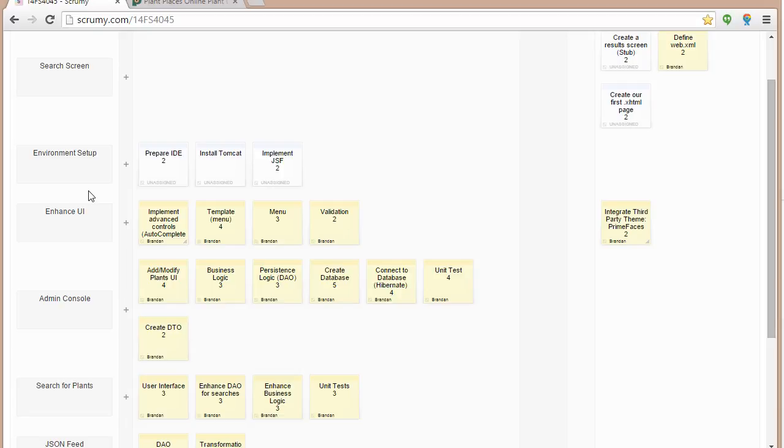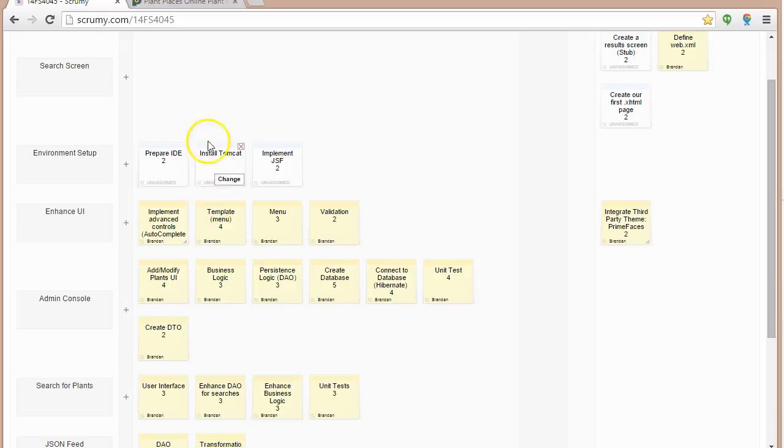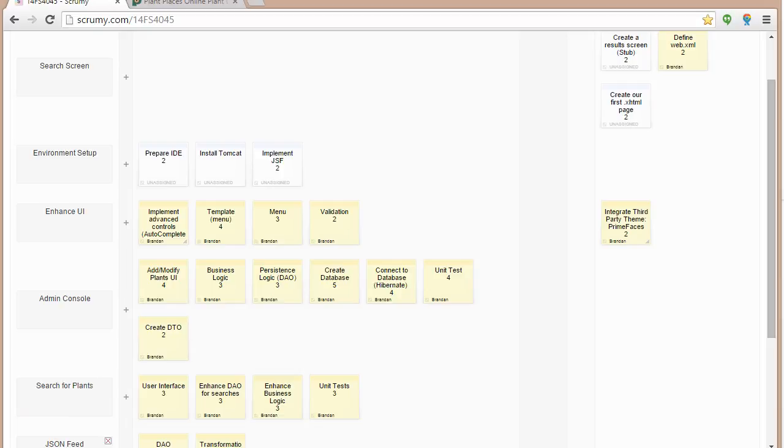So with that, I'm looking forward to seeing your Scrum board. I will take a look at it and maybe add some advice. One thing you don't want to have is stories with the same exact tasks from one to the other. You also don't want to make the tasks too general, like make the UI, make the UI, make the UI, and then make the persistence, make the persistence. Try to make sure that the task is descriptive of the story. So I look forward to seeing your Scrum board, and I look forward to giving you feedback. Thank you.